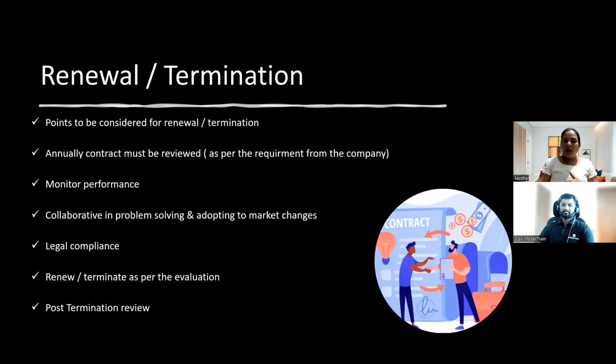So you will have to renew the contract, deciding whether you will still maintain the same technology or go with the latest technology based on the project requirement. Please review the contract. Exactly. And the resources who are deployed for that project will not have the new set of skills, so you will have to upgrade the skills as well, right? You cannot have the same resource do something he is not trained for. True. So that is why contract renewal is very important.